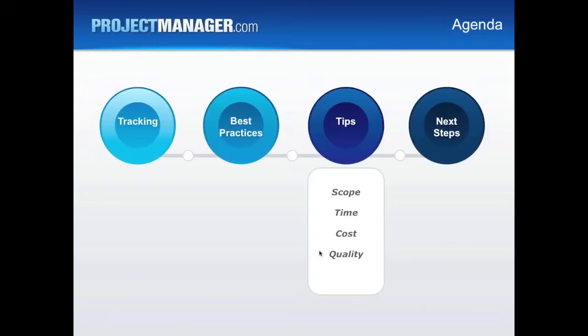So when we look at the planned, and then as we move along, actually what's happening. When we look at variance, in the beginning I talked about variance. Variance is planned minus the actual. So if changes happen, which they do, the project manager is to bring the changes to the change control